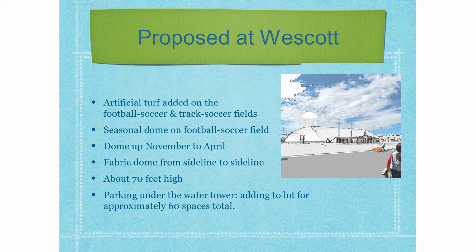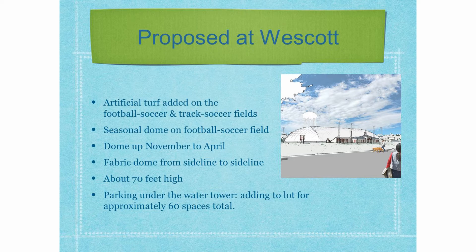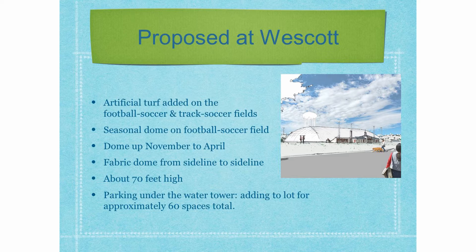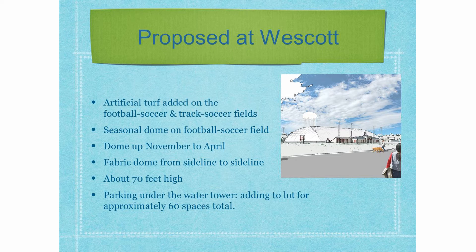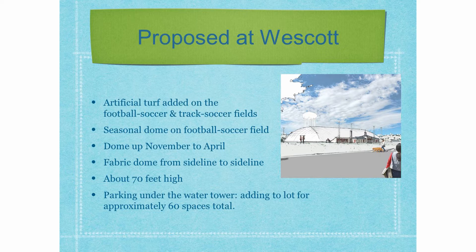What is proposed, and I guess what's going to happen as soon as the spring thaw hits, is artificial turf added to two fields at Westcott. The football soccer field that's in the stadium, and then the field that's inside the track. Then there will be a seasonal dome over the football soccer field. It will be up from November to April.